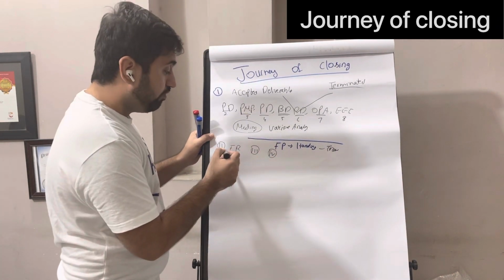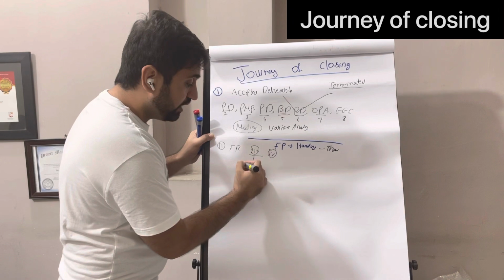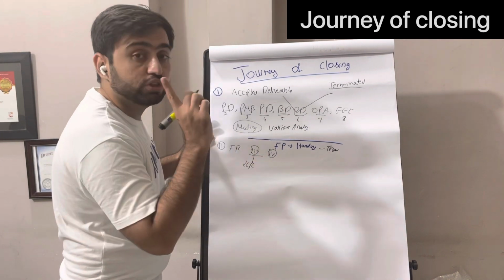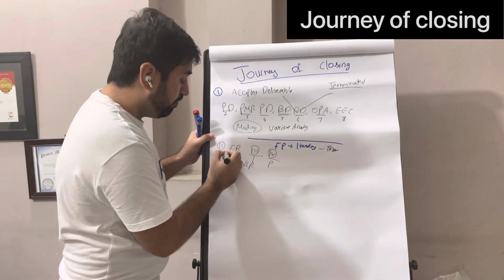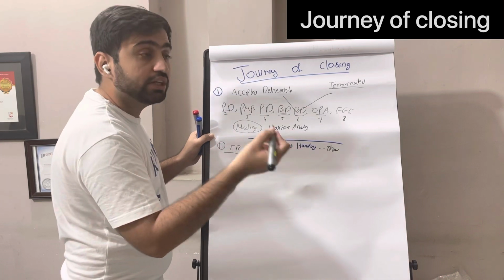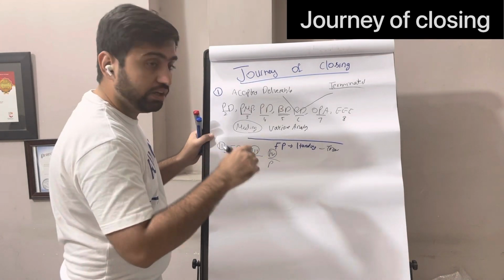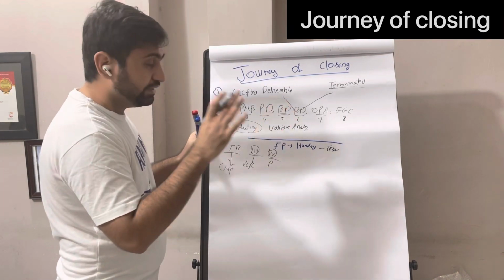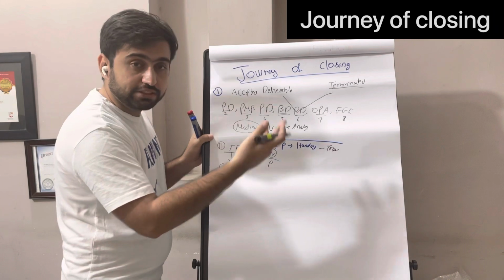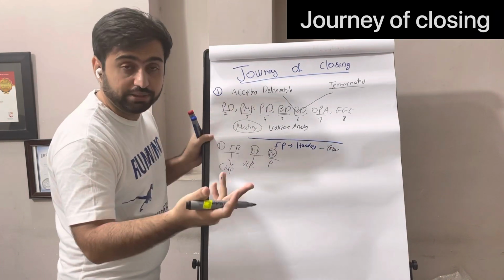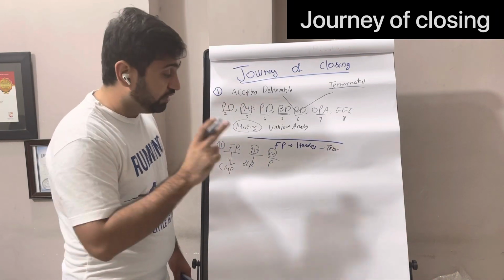Once the final report is finalized, lessons learned are updated and checked, lessons learned are put into the lessons learned repository. All the project documents are put into the project documents archive. The final report is submitted to the sponsor. If the sponsor approves, we communicate following the communication management plan. All the lessons, all those things are done. Then we start closing contracts, all the procurement contracts, open issues, and now we release the team. This is very important, very critical. You cannot release the team without closing all those things.